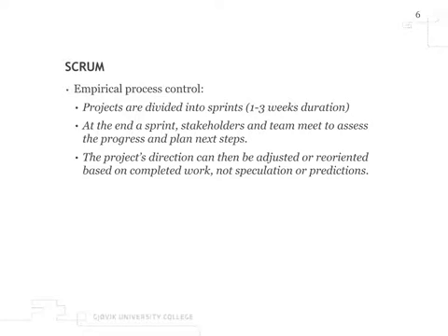So at the start of a sprint, you start by prioritizing your requirements. Maybe you have formalized the requirements in user stories, for example. Then you sit with your product owner as a team, and you discuss what to prioritize for the next 2 weeks if you have 2-week sprints. You see? And then you sit down and work. Maybe you have daily Scrum meetings within your team, so you work through this 2-week sprint.